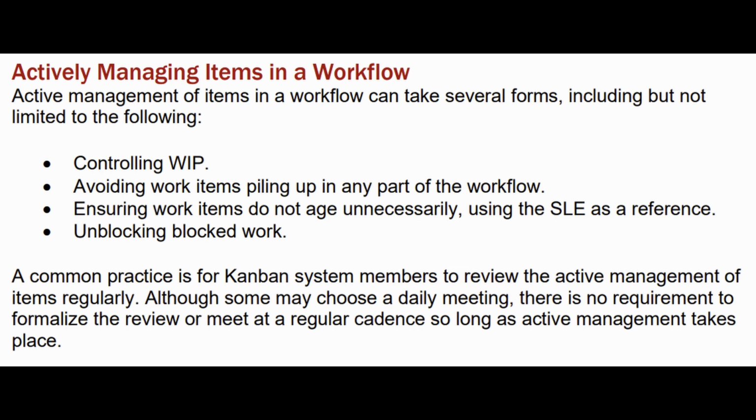Can we split items up? That's a common one where folks believe that because something is started as a unit of value, we cannot split it up further. Absolutely, something started, you can split it up. So what are all those interventions that we can take when something has started aging to limit how much it ages, especially when measured against that SLE?